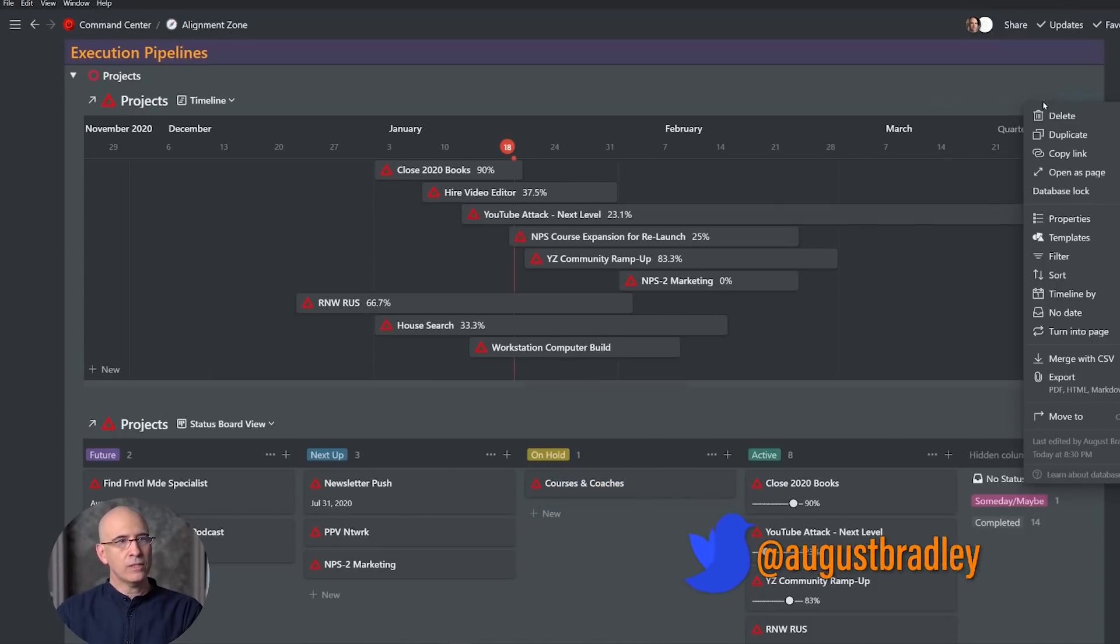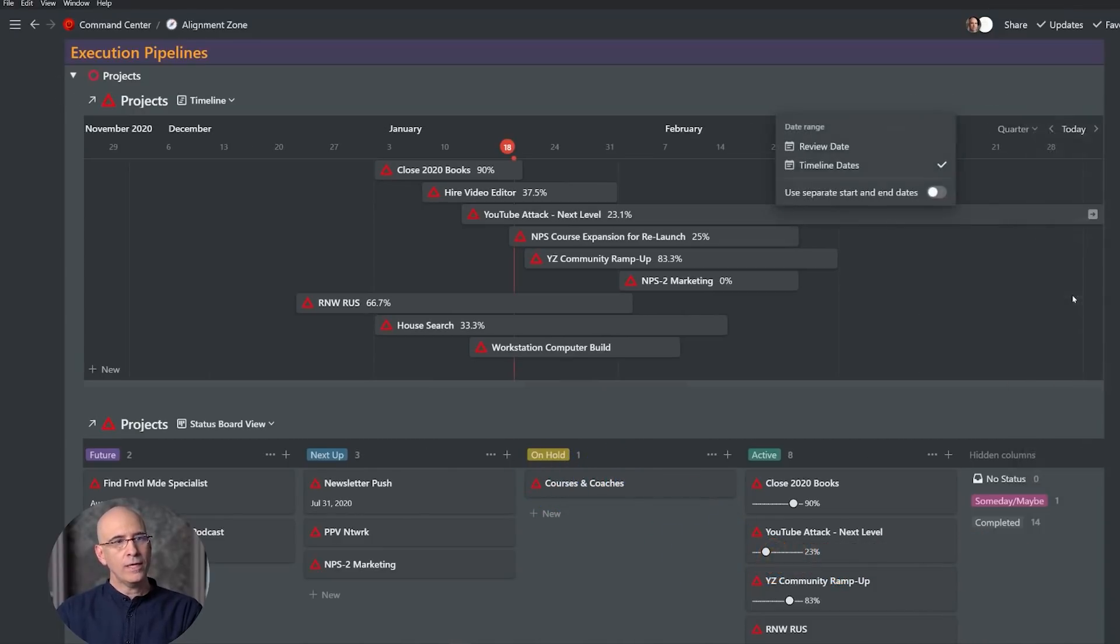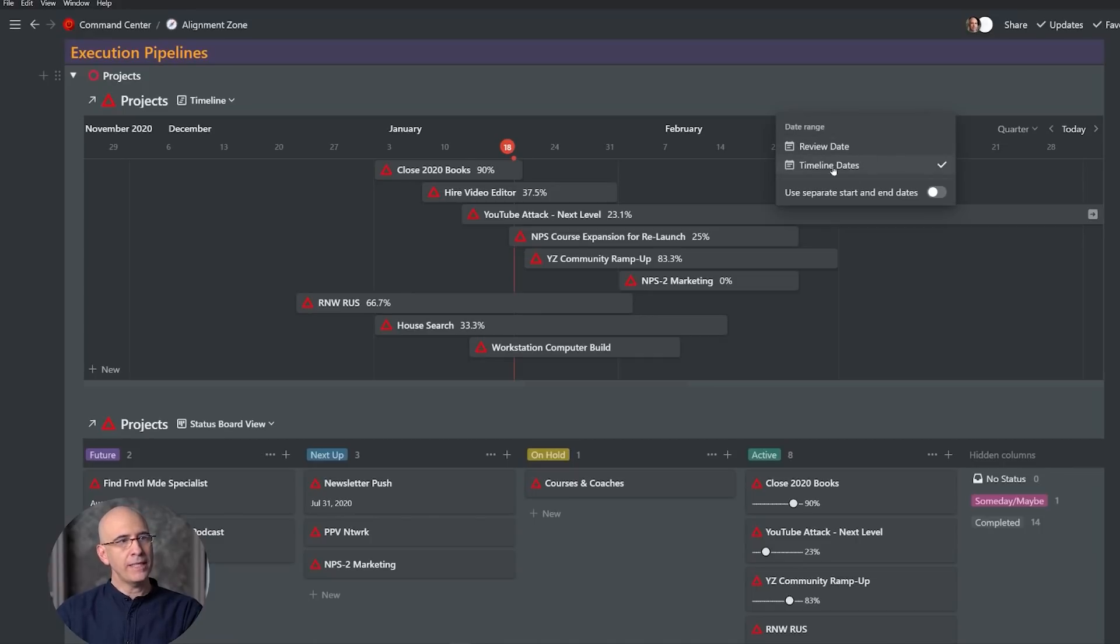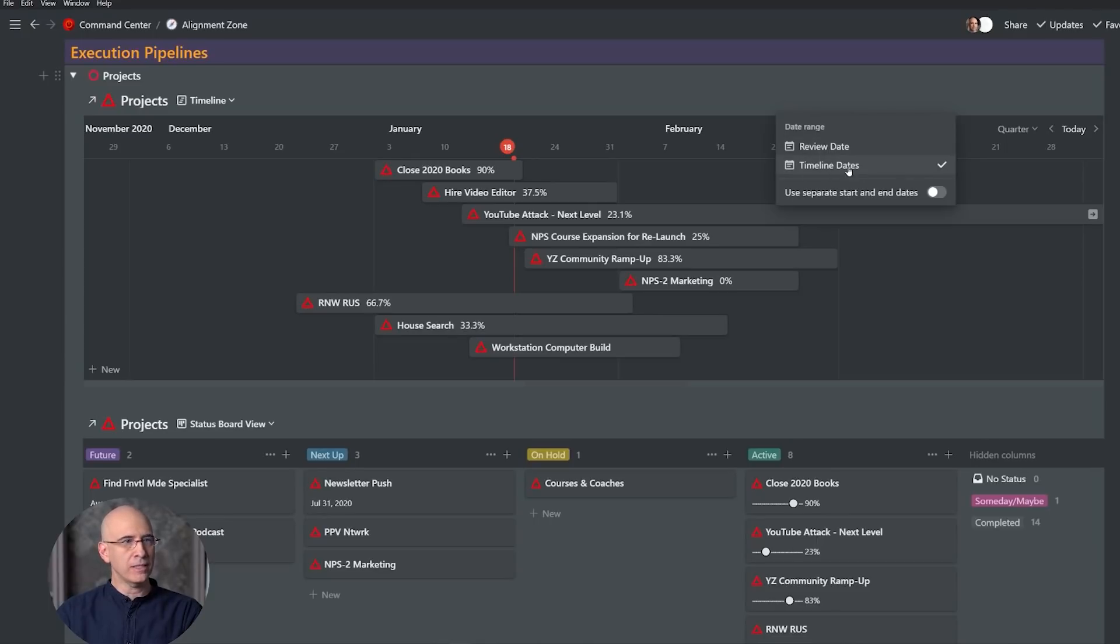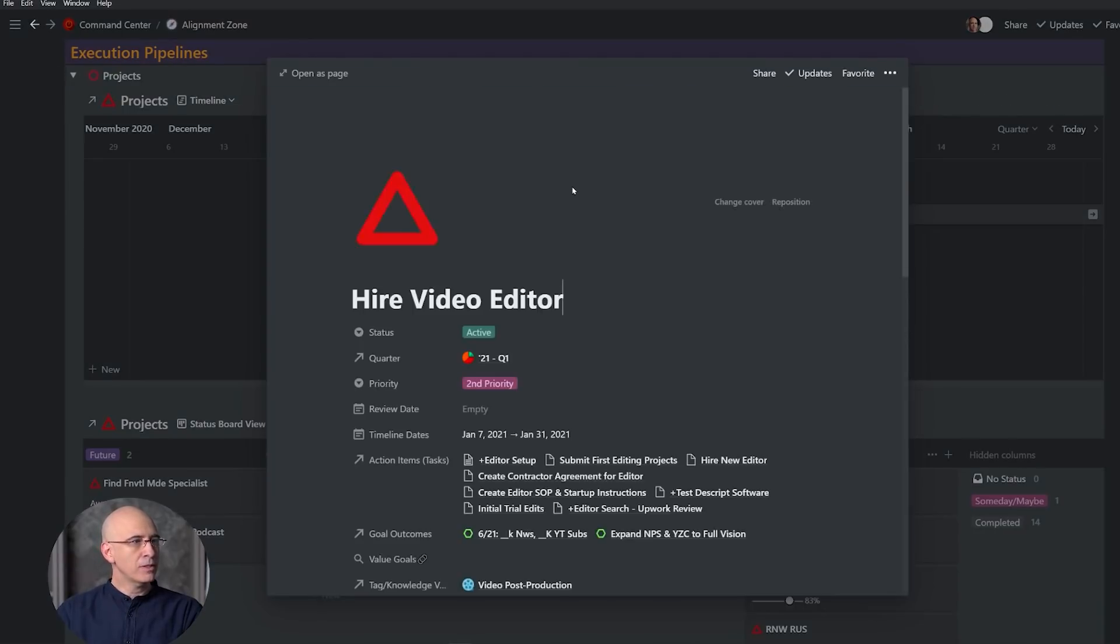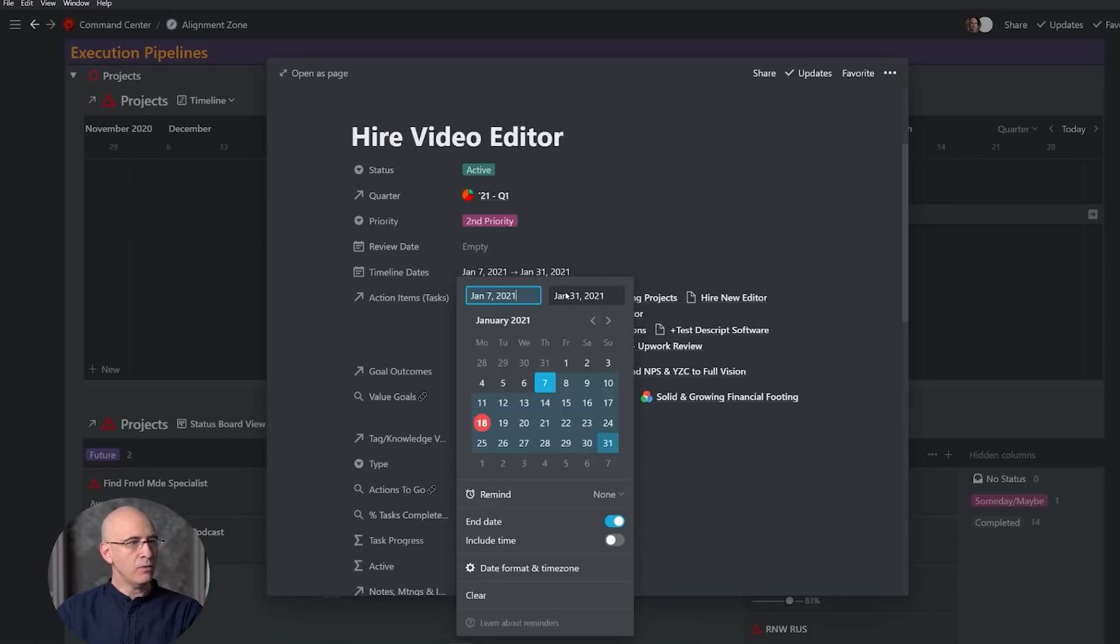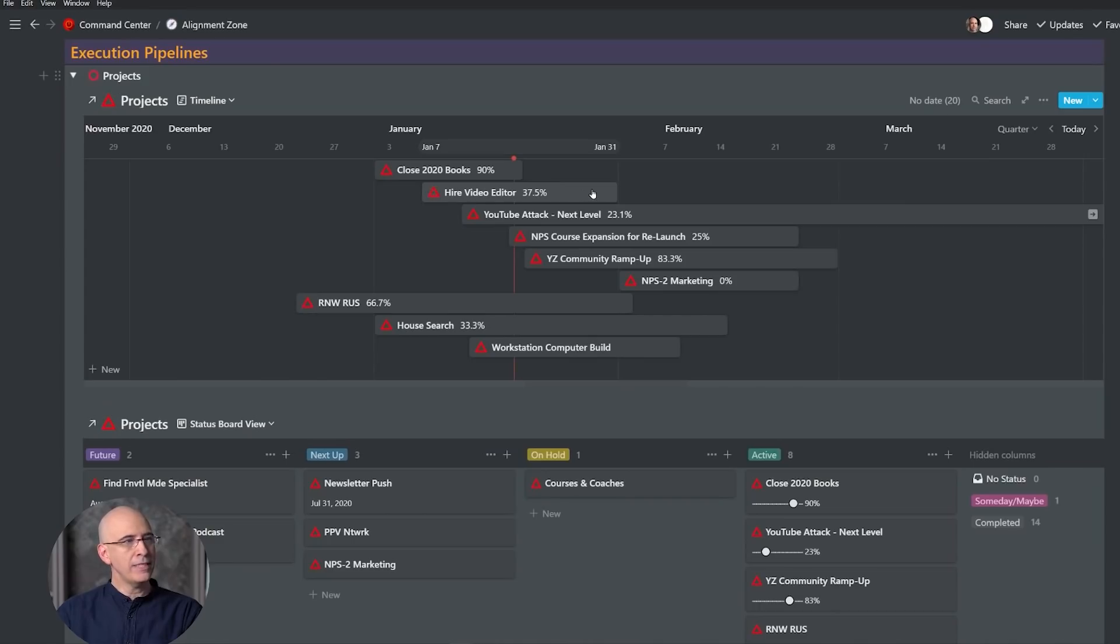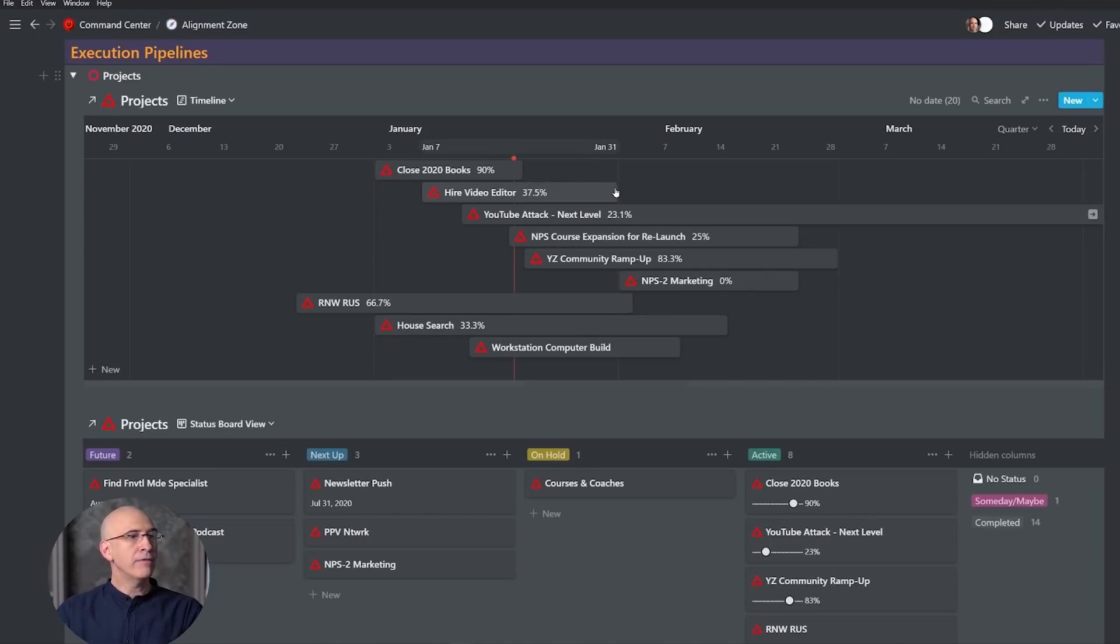Now critically, you can click on those three dots and choose what the timeline is being generated off of. It's being generated off of a date property—you have to have at least one date property. If you have multiple ones, you can pick which date property to use. I've chosen my Timeline Dates. You need to have a start and finish. So if we open one of these up, you'll see the Timeline Dates has a beginning and end. The way you create that is you just click this end date toggle on the bottom, and then you choose the start date and the end date.